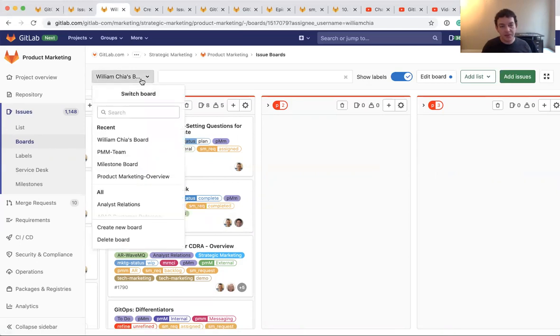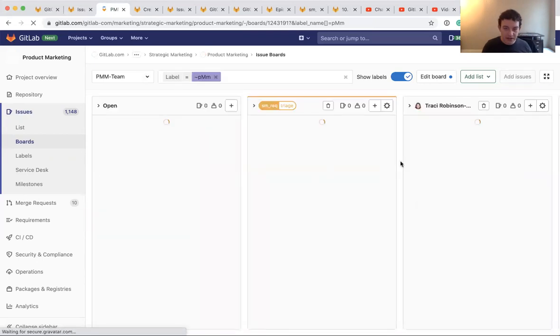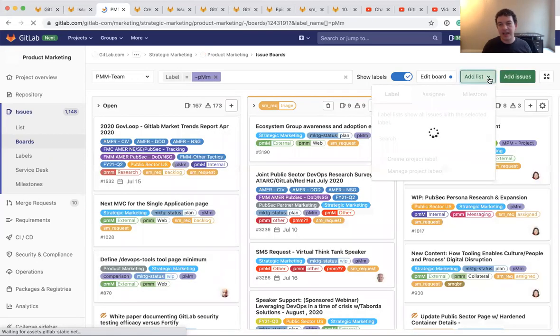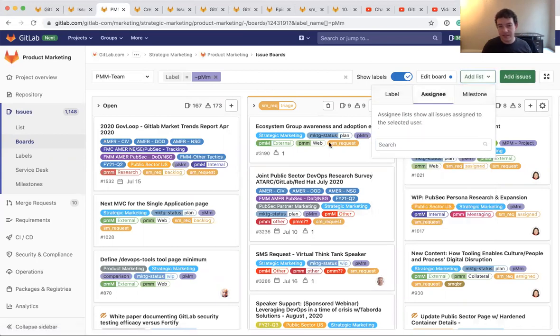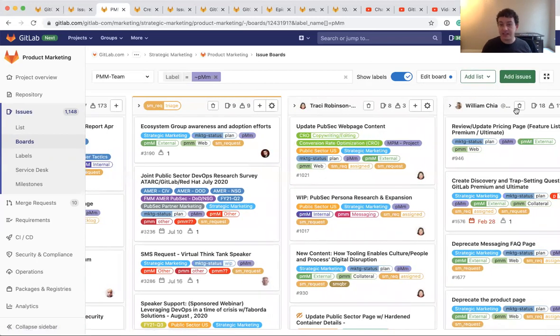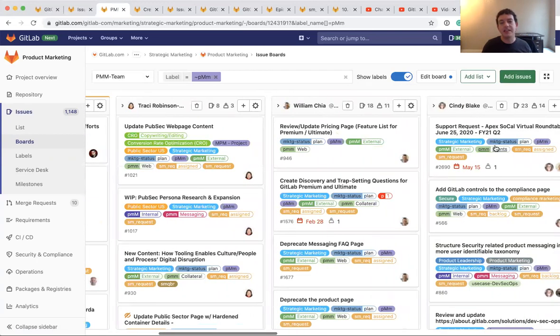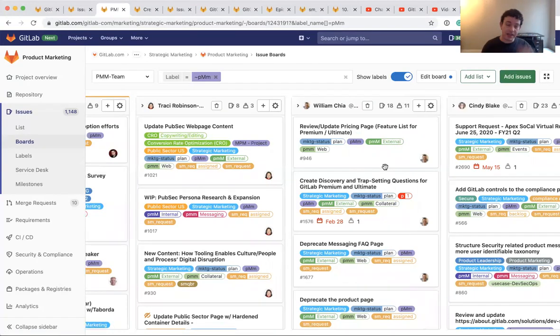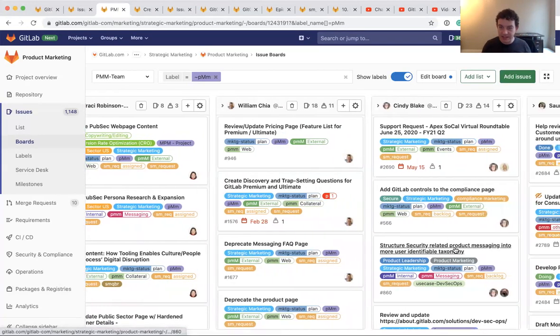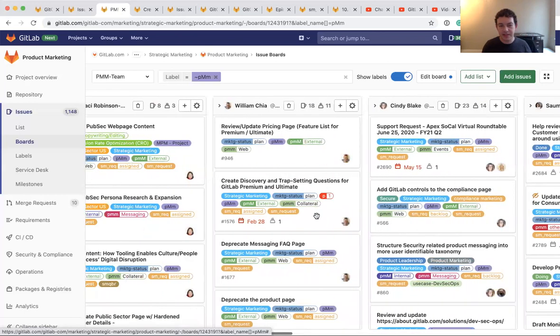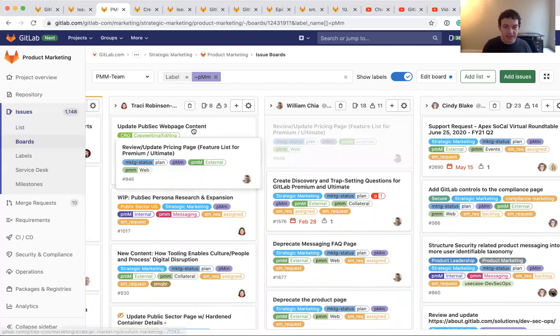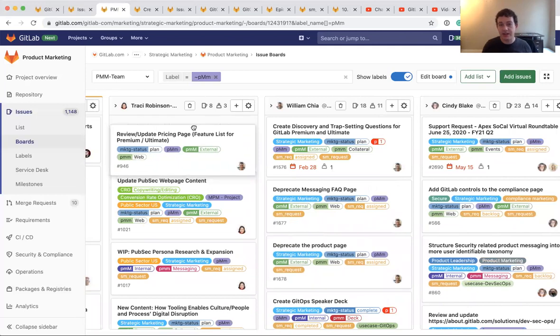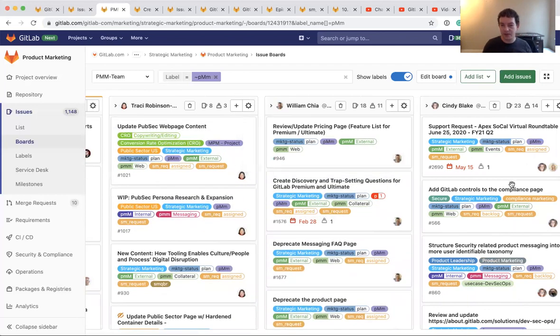You could also have a board that is a column by assignee. So what we call the list. So for example, you can see, I can add a list here and a list could be a label. A list could be an assignee or a list could be a milestone. So, this is the PMM team board. And you can see there's a column for Tracy and there's a column for me and Cindy. And so this is showing at a team level, I can see what is all the work that's assigned to Tracy. What's all the work that's assigned to Cindy and Samia. And so if I wanted to take an issue here, like review this updated pricing page, and I wanted to assign it to Tracy. If I dragged it over here, just like dragging on a board would change the label here. It would unassign me and it would assign Tracy. Moving cards across the board takes that issue in it and it changes whatever state that is.